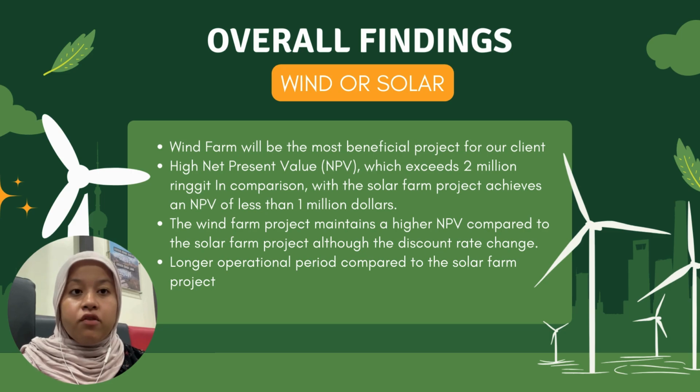a financially attractive option. In addition to the NPV, the wind farm project also boasts a higher internal rate of return, calculated at 10%, compared to the solar farm project. The higher IRR further strengthens the case for the wind farm project as it implies a greater potential for profitability and a faster recovery of the initial investment.